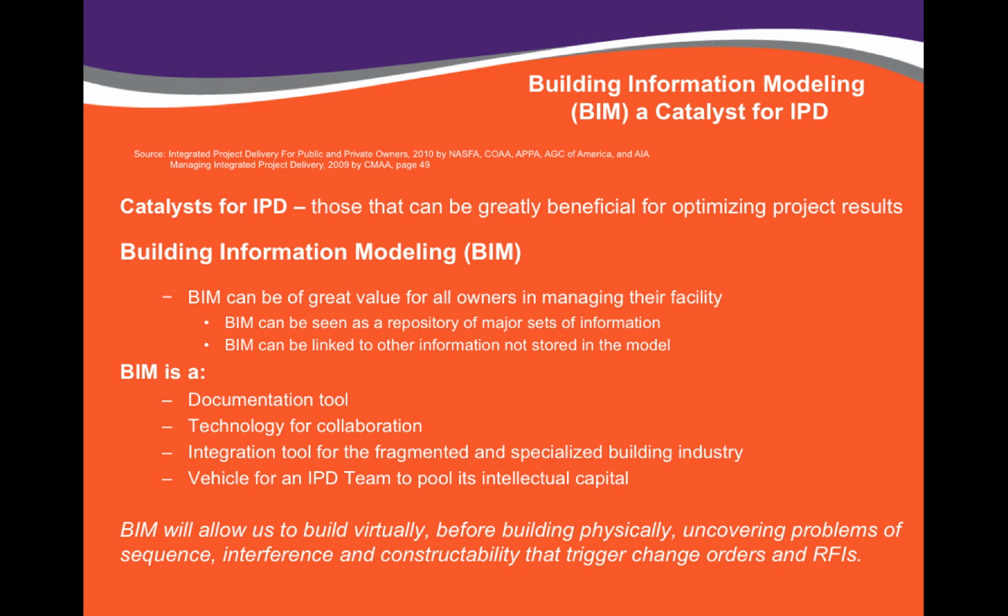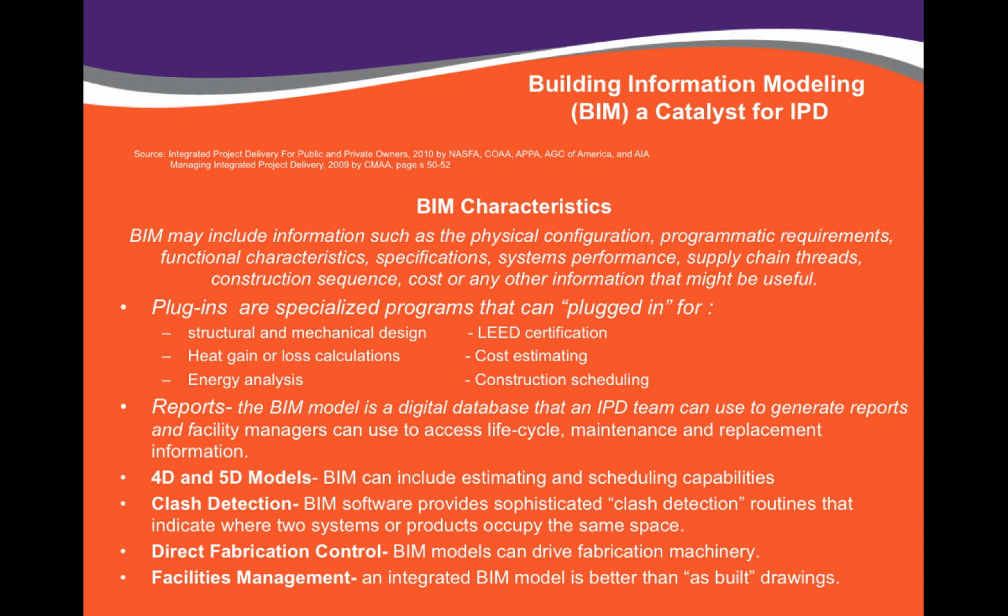BIM is a documentation tool, but it's also a technology for collaboration. It's an integration tool for the fragmented and specialized building industry, and it's a vehicle for an IPD team to pool its intellectual capital. BIM will allow us to build virtually before building physically, uncovering problems of sequence, interference, and constructability that trigger change orders and RFIs. BIM can also include information such as the physical configuration, programmatic requirements, functional characteristics, specifications, systems performance, supply chain threads, construction sequence, cost, or any other information that might be useful.